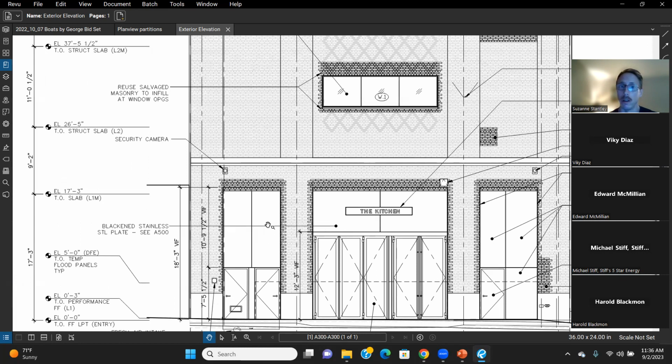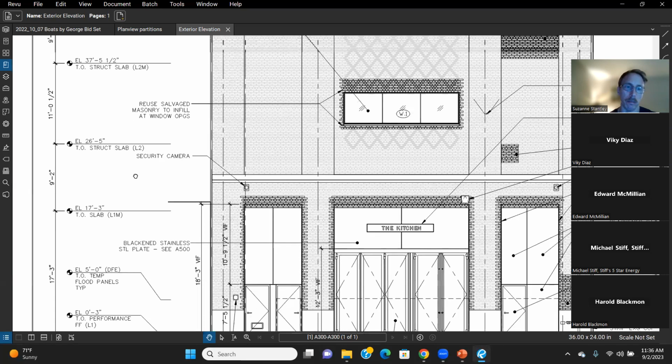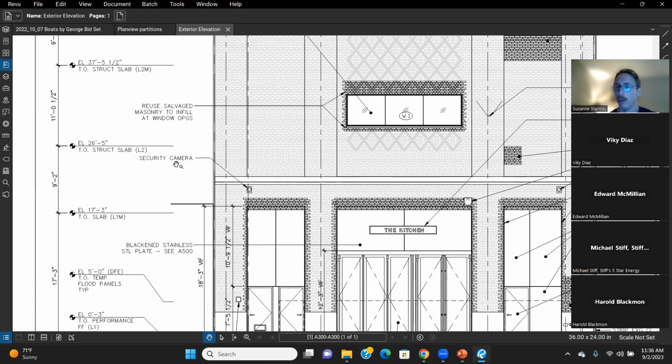That's why there are addenda that we talked about earlier. No matter how hard they try to get these drawings to be perfect, chances are one of you guys or one of the contractors bidding is going to find something wrong and submit an RFI, which is just a question saying, you've got this shown on this drawing, but not on this drawing. Please clarify which one is accurate. But yeah, it is just good to double check. Use multiple drawings to check things you're not sure of.